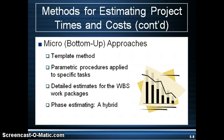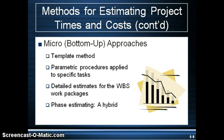Range estimating is generally used when there is unfamiliarity with the work needed or if it involves new technology. It's a popular method with software projects or developing new products. The group will give a low, average, and high estimate, which provides a range to work with. This helps reduce surprises that may come up due to ambiguity in work packages. Essentially, these estimates are developed from the details in the work packages in your work breakdown structure.